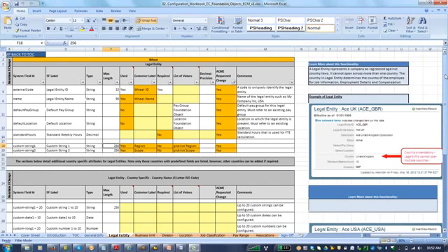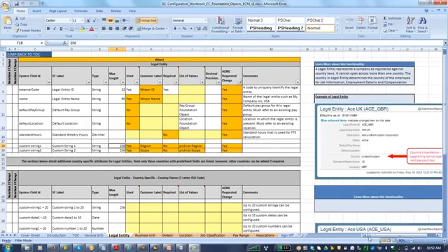So this is a living document, and we need to help them constantly keep updating it with the changes and whatever is relevant for them, then take the sign off and do the config accordingly. Once this is prepared, our job is done. The major work for us will be to get the configuration workbook done, and also the field mapping for the user data file. That's another big job in Employee Central.